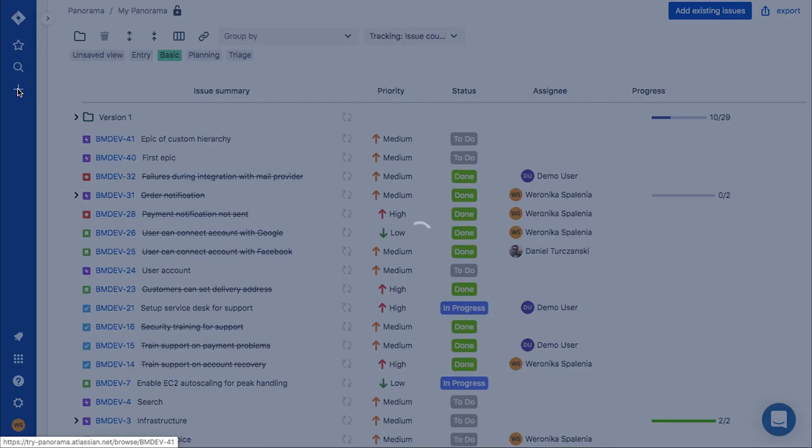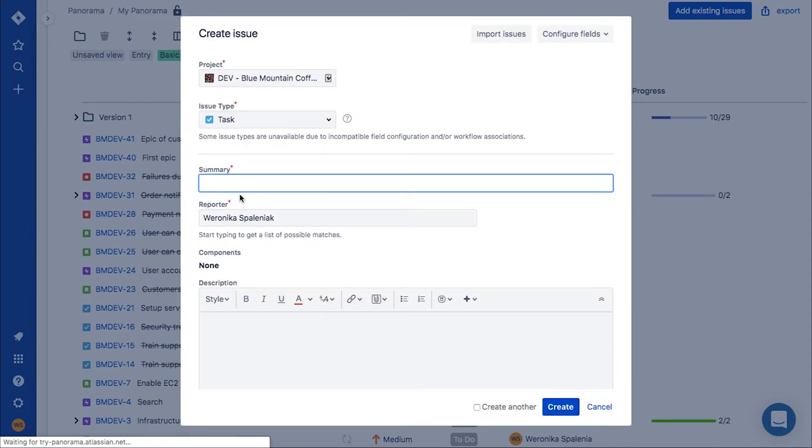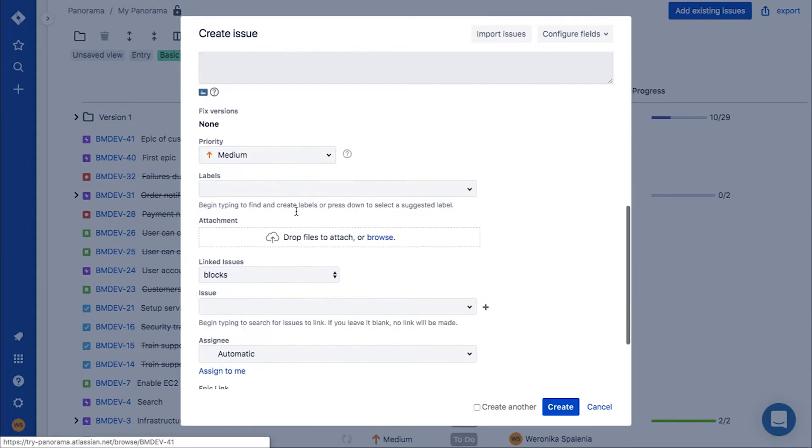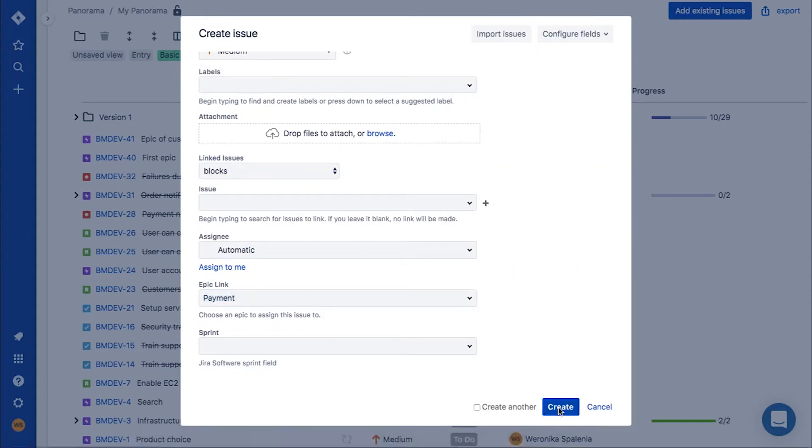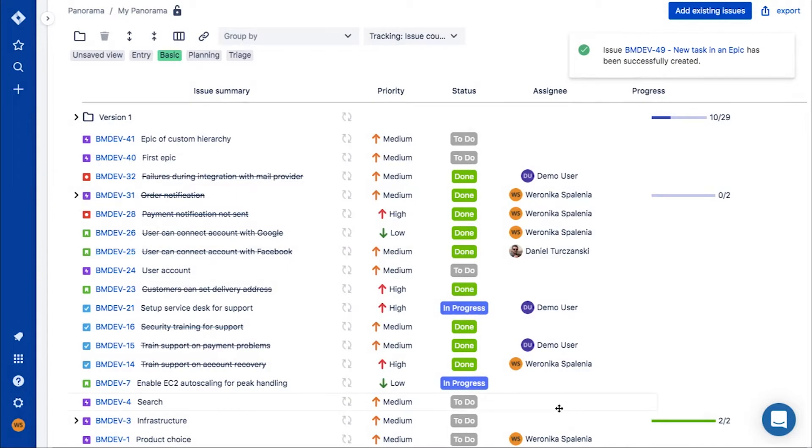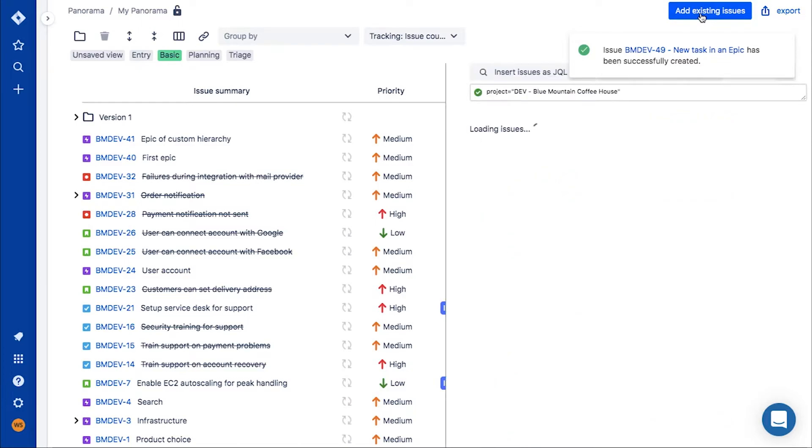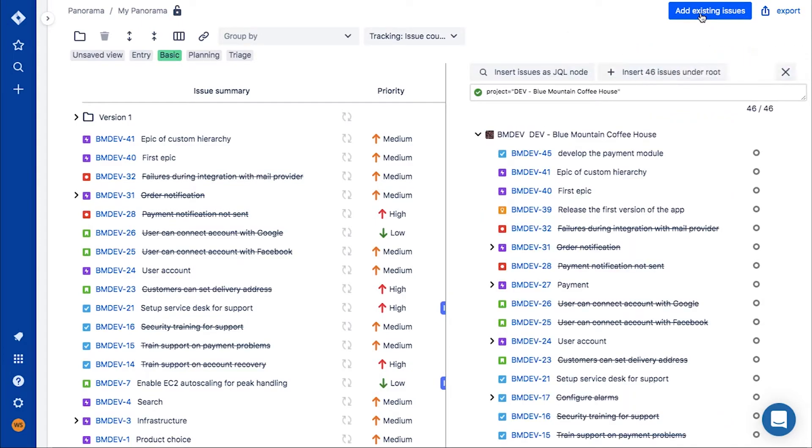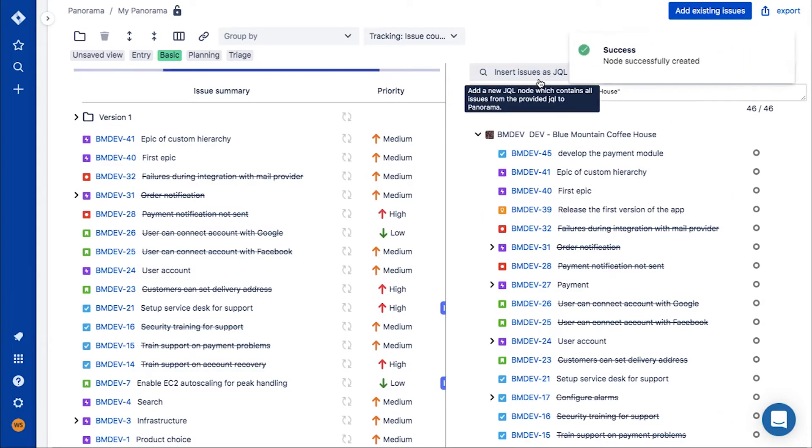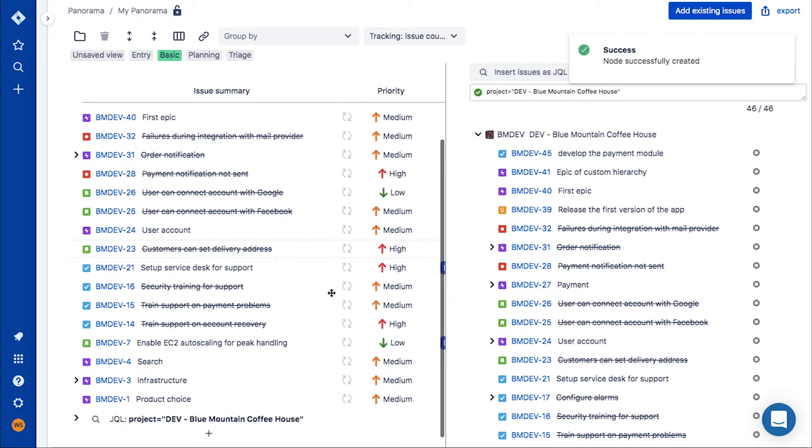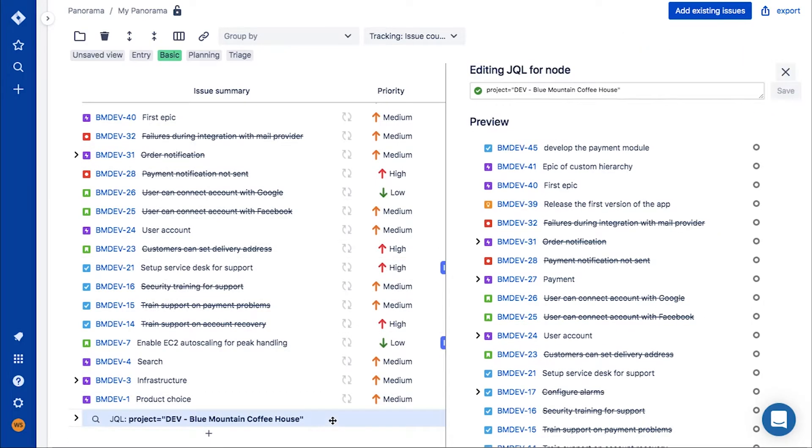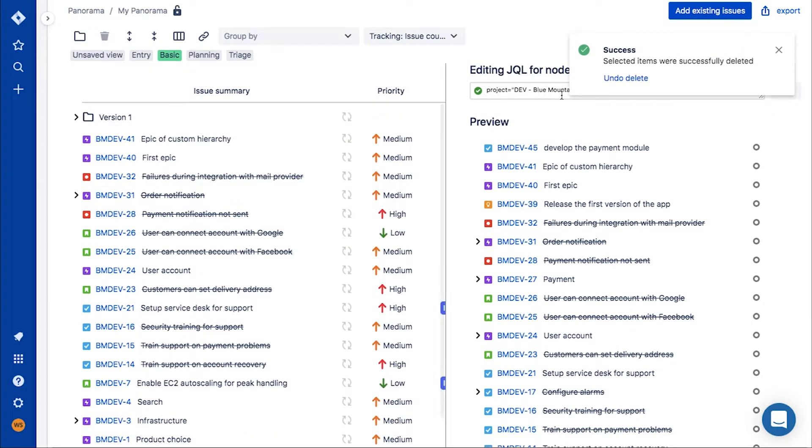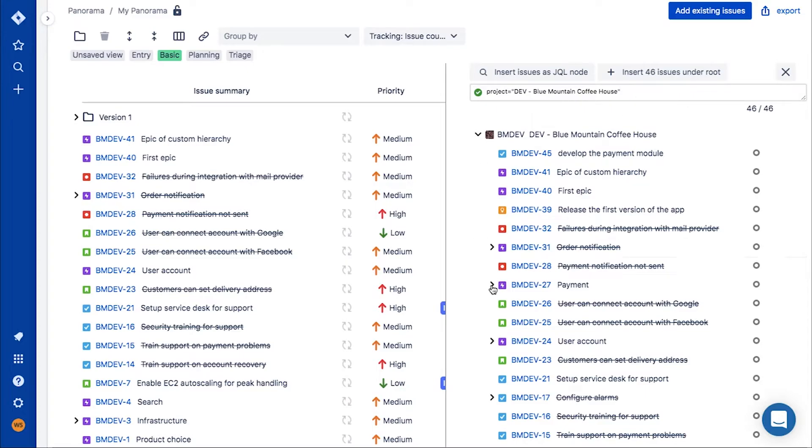If you added a new issue in Jira and you would like it to appear in your panorama, we have three options for you. Option number one: you can add issues from a project as a JQL node. Issues will be updated automatically with their structure mirroring the structure in Jira.